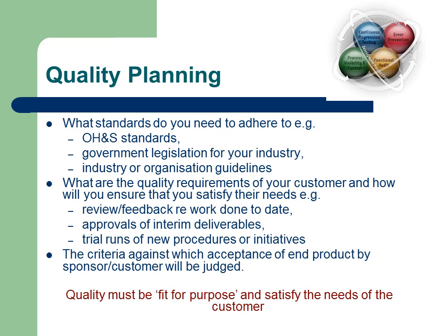The first step is quality planning. The quality management plan in the PMP should describe how the project management team will implement its quality policy. It should describe the project quality system, the organizational structure, responsibilities, procedures, processes and resources needed to implement quality management. The PMP template provided in your resource kit provides you with a guide for what should be included in the quality management plan.